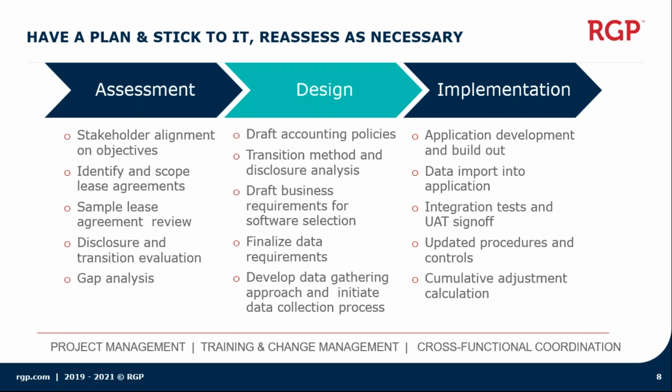Understanding that those are 4 different and distinct work streams with a significant amount of interdependency, we suggest the use of a comprehensive project plan to align all of the interdependent activities and deliverables and make sure your project stays on task. We would typically anticipate that an overall project would take anywhere from 3 to 4 months to get through all of the associated methodology.